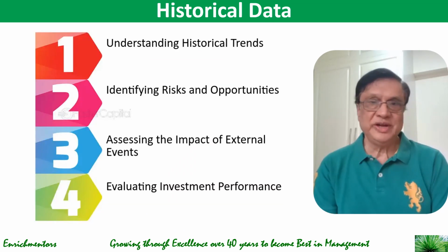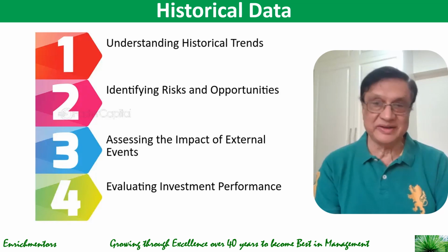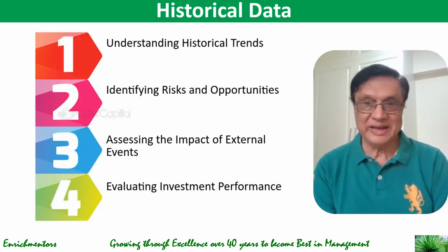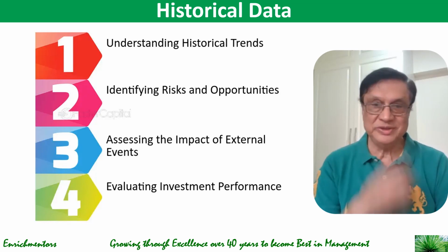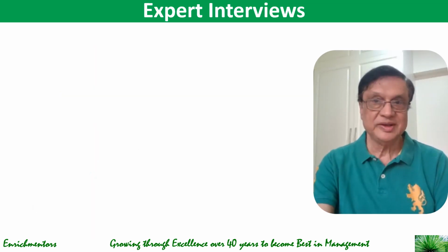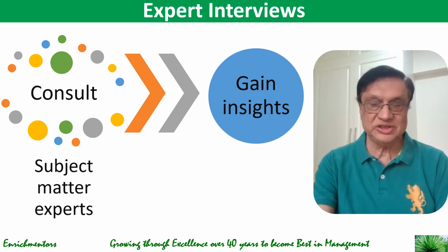Also, you can review data from similar past projects to identify common risks using historical data. There you understand the historical trends about the industry and about the solution that you're looking at, identify what the risks are, assess the impact of external events that can happen in the industry, and evaluate the performance of your investment in that proposed solution. Also, you can consult subject matter experts to gain insights into the potential challenges.